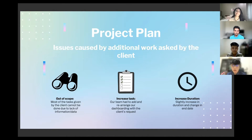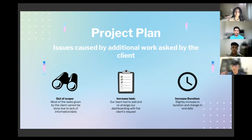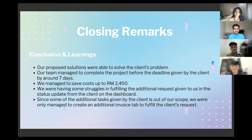For issues caused by additional work requested by the client: first, it was out of scope, as most tasks given — for example the balance sheet, working under a department, or posting to an online server platform — could not be done due to lack of information. Second, increased tasks: our team had to rearrange and add the invoices list as requested, which slightly increased our duration and dates.